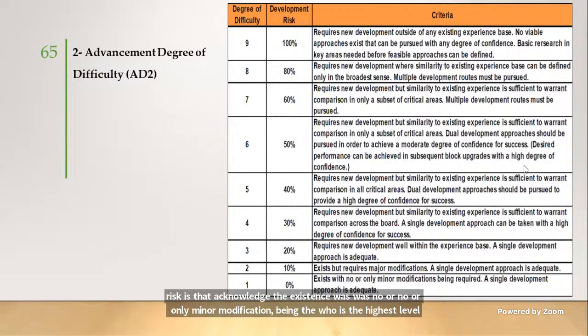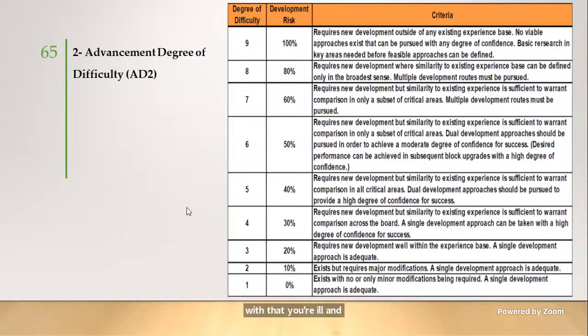The TRL and the AD2 are intended to be used together to perform an integrated technology assessment. The AD2 uses the result of TRL as inputs. As such, they are linked together. However, TRL assessment can be performed without performing the AD2 assessment.